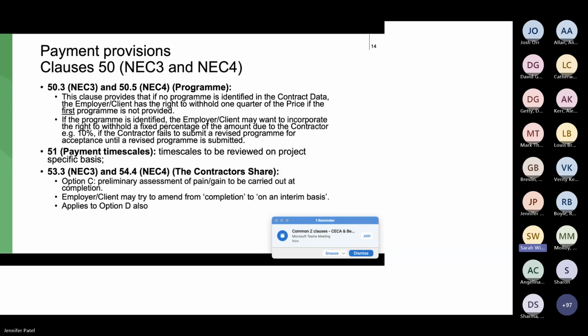This change arises out of some recent case law, because these are the pain/gain sharing contracts, which basically provide that the contractor through the course of the project is paid on the basis of the schedule of cost components plus fee percentage. So it's the actual cost basically, plus the fee percentage, paid all the way through the project until completion.